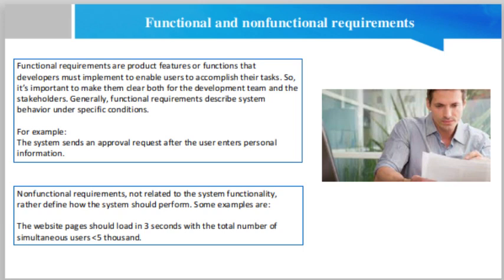Small, good user stories tend to be small enough to plan for short production releases. Small stories allow for more specific estimates. Testable, if a story can be tested, it's clear enough and good enough. Tested stories mean that requirements are done and ready for use.